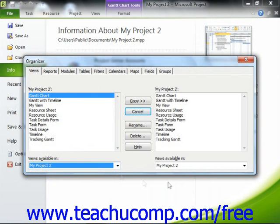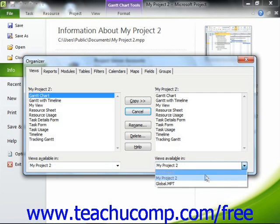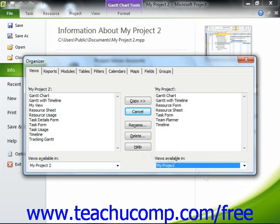Then use the right Object Name Available In dropdown to select the name of the project file into which you want to copy the specific object. At this point, you should see the name of the object to transfer shown in the listing at the left side of the tab.